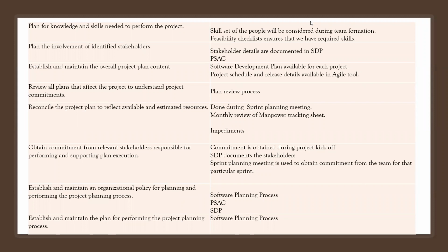And the next one is establish and maintain your overall project plan content. Of course, our Agile tool or the Agile process does a lot of scheduling, burn down, and release details, and for DO-178 the PSAC and SDP do the software plans work. Review all the plans, and that's a CMMI requirement. And of course, we have a plan review process for DO-178, and that can be incorporated in your Agile.